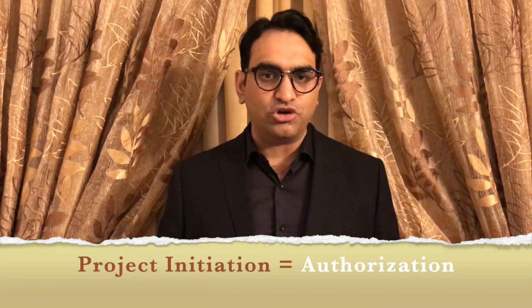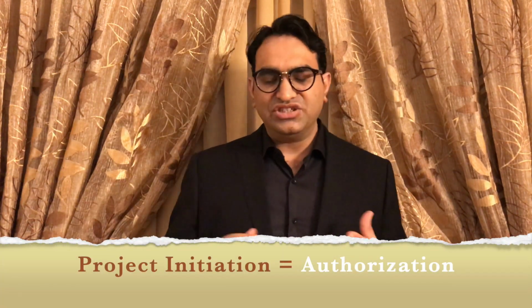The intent of the initiation process group is decision, as I describe it, but generally PMI says the intent of the initiation process group is authorization. And when we talk about decision, it means you are making two decisions. One decision is whether we are going to do this project or not, or if we are doing this project, who will be the project manager.